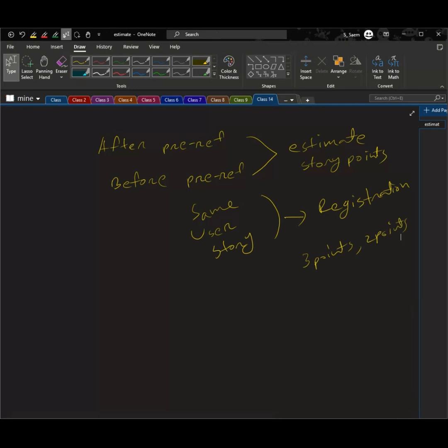So after the individual work, the team conducts a walkthrough meeting. Its objective is to combine all identified scenarios and finalize the effort estimate collaboratively. So tester 1 and tester 2 compare their findings. Tester 1 found 10 scenarios and tester 2 found 15 scenarios with 5 overlapping scenarios. They merged their findings to create a comprehensive list of scenarios. After discussing their estimates, they agree on a final estimate.